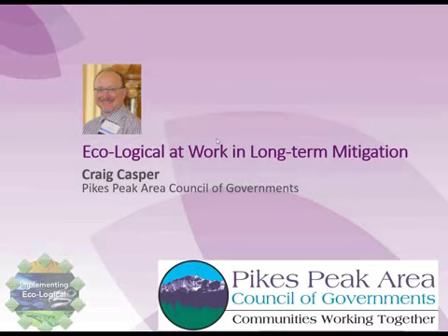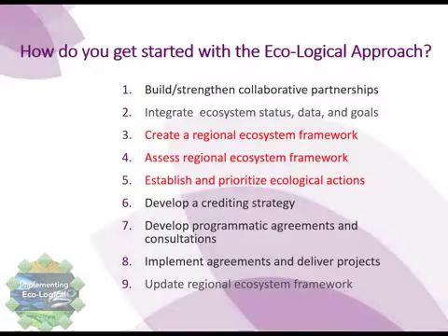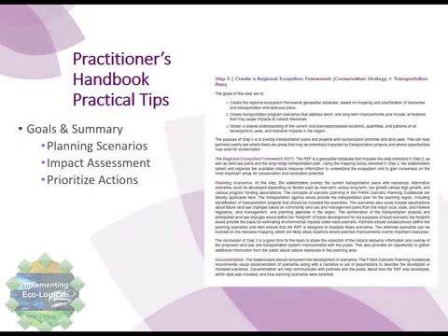Good afternoon. Following Margaret's presentation, I will be focusing on the next steps in the ecological approach, how we prepared a regional ecosystem framework, as well as explain the benefits it provided, along with some lessons we learned during the 3 progressively more detailed efforts that we began in 2006. That is a key lesson we learned, actually, is you can't expect to build the trust and get the data and conduct the analyses necessary for a complete and rigorous regional analysis in one 4-year planning cycle. It takes a continuous, comprehensive, and collaborative approach over successive plan efforts.